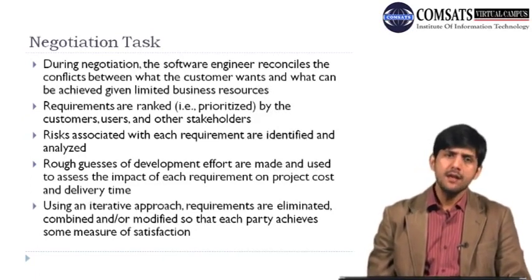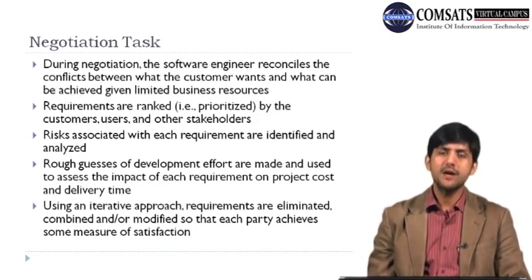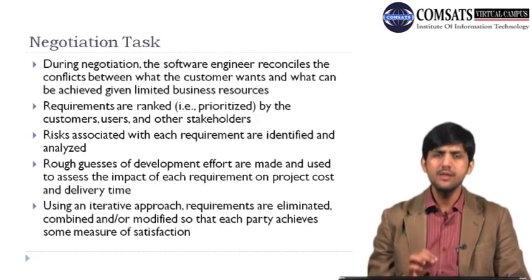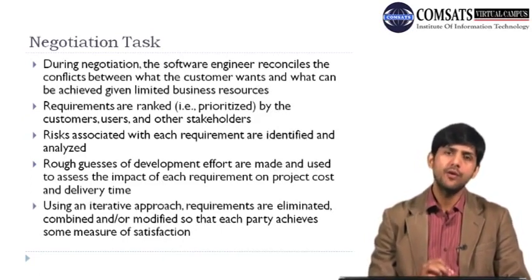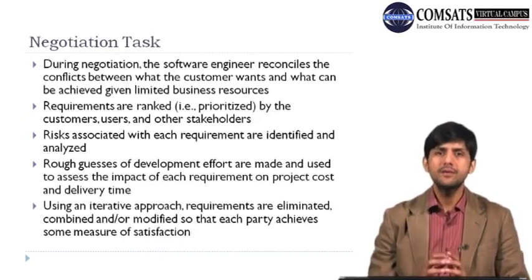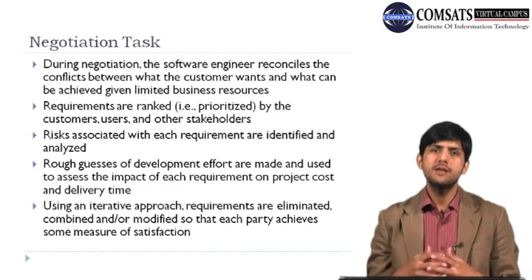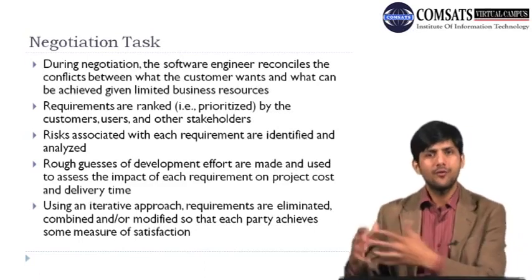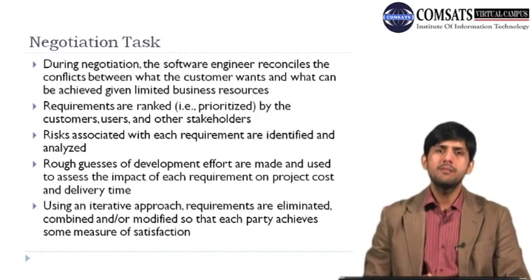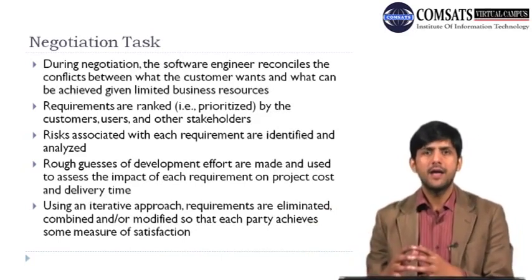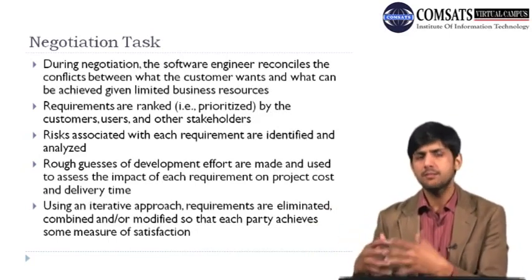Then another thing which is done in the negotiation stage is that you try to identify all the risks which are associated with any requirement. For example, you have a hardware requirement where you say you need to buy a certain kind of server, and one of the risks may be that the product is out of order when we actually need it. Or maybe a software requirement says that you will use a certain API, but later on you figure out that API is no longer supported, so that maybe is a risk.